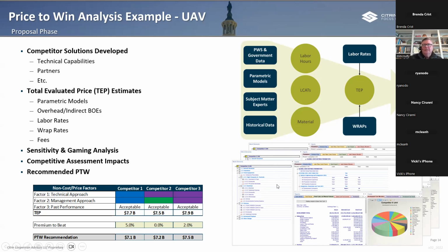Now we're working at price. Cost is cost, right? You know, the direct labor, the materials, recurring, non-recurring engineering, indirect costs, overhead, G&A, fringe, and all. It doesn't have any fee on it. It doesn't have the treatment of the team and how all that stuff works together towards price.